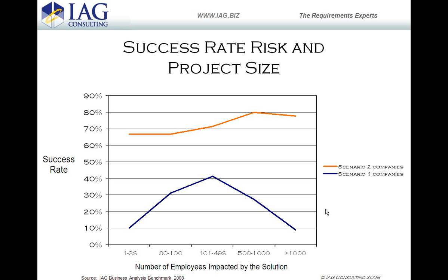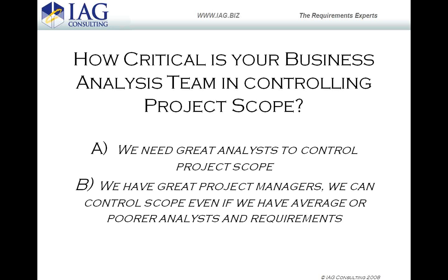Then the very, very large ones are just that much more complicated, and they tend to have higher failure rates, right? So Dan, you're saying business process reengineering, and you're trying to implement a solution at the back end, yeah, you're going to have potentially much higher failure rates unless you're very good at defining the processes using a requirements elicitation methodology, okay? And you drive that systematically. So what I'm trying to do here is bring out some of these ideas for you so that you can use the baseline in helping you to identify risk within your organization.